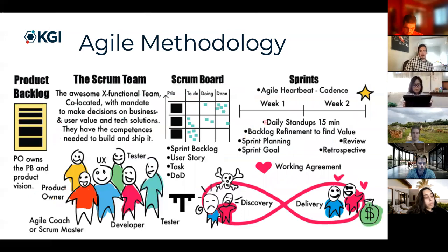So this slide is a little bit more about the actual implementation of Agile. We talked about the principles already. Let's talk a little bit about how you actually use Agile. There are a couple of principles. One is the product backlog. When we talk about product backlog, do you remember when you created your user stories and a list of functions that satisfy those stories? That's your product backlog. It's all the different functions that I feel I need to build based off of my customer's needs.